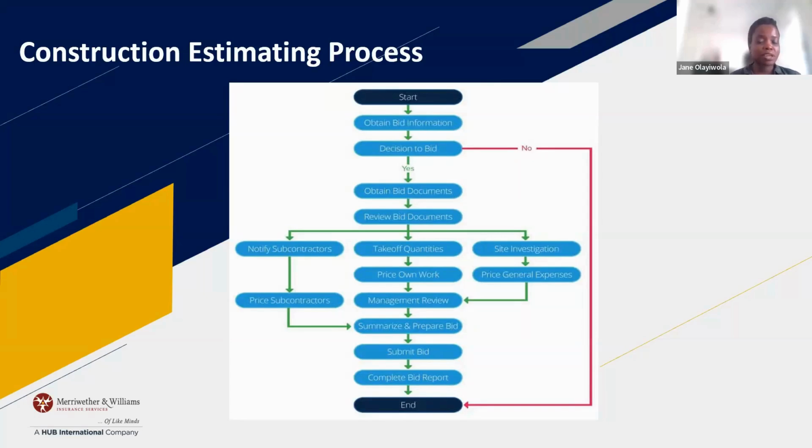And the client, the GC, may have carried some contingency in their internal budget that they might be able to release for you to cover that cost. They probably will be unwilling to cover the whole amount, right? But maybe they'll cover a portion, maybe you'll agree to do a 50-50 split. That's usually how you can approach that. Most people just want to share the responsibility, share the risk and move on to other aspects of the project, because you don't want to stall, you don't want to waste time unnecessarily. So that's probably the best way to approach it without the use of legal instruments, because that could definitely lead to other repercussions. Does that answer your question, Patrick?